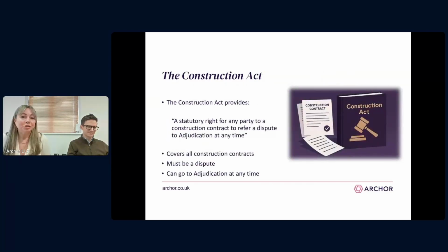So what does the Construction Act actually provide for? Well, it gives a statutory right to any party to a construction contract to refer a dispute to adjudication at any time. As I said on the slide, this covers all construction contracts. So if you've got a dispute, and provided you have a construction contract, you can adjudicate. Hooray.